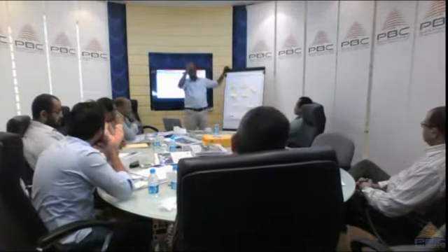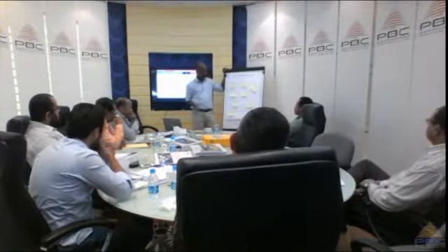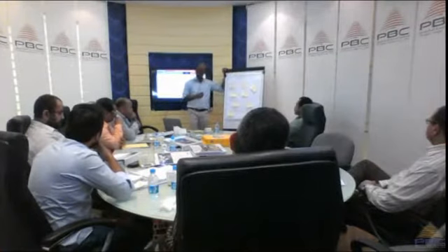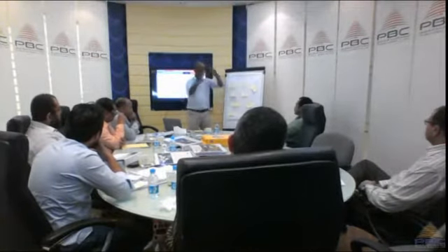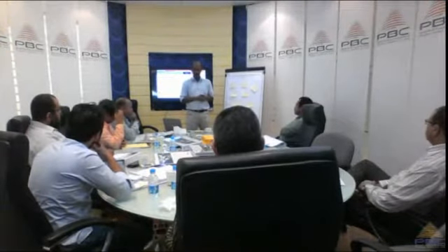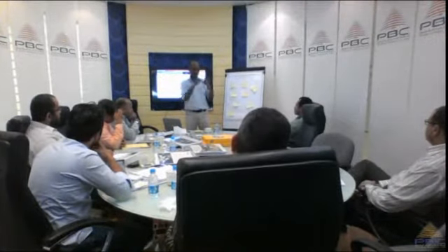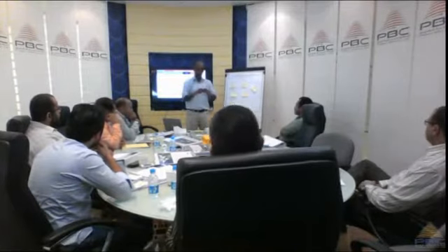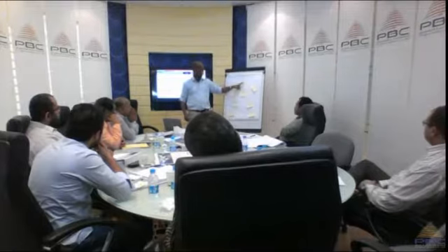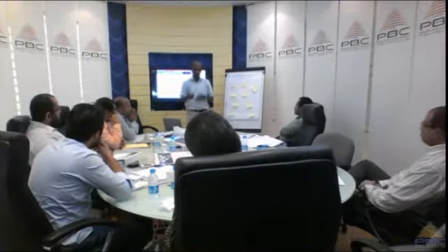Exactly. Depending on the policy, right? What about risk tolerance? So threshold is, let's say we say the threshold of PBC when it comes to risk is 5. So any risk above 5 we'll deal with it. It's called the risk threshold, management threshold.